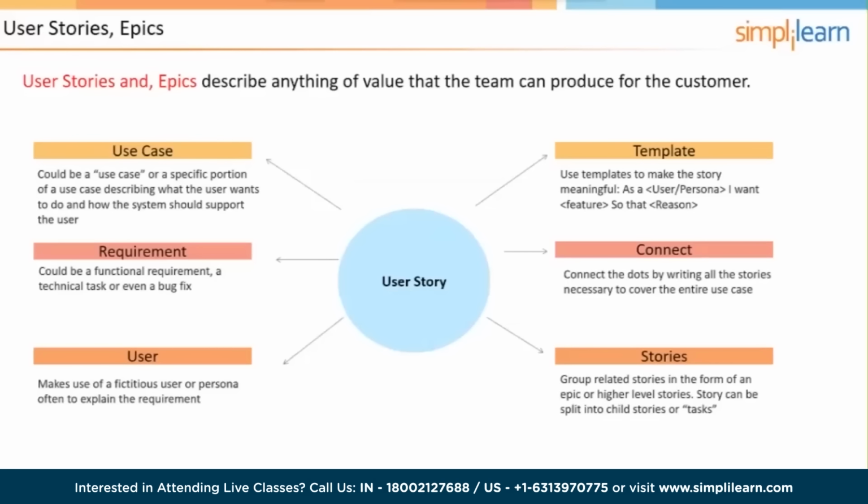So an epic is big. You would never do an epic, a theme, in a sprint. It's too big, so it's used for planning purposes. Below that, I would put epics. Epics are low priority, large user stories, meaning that an epic will eventually have to be disaggregated into multiple user stories. The reason it would be low priority is because if an epic was higher up on the product backlog, it would have to be more detailed. That's when you would break it down. So epics are usually going to live at the lower priority levels of a product backlog, and as user stories are completed and the epic rises in priority, it will eventually be broken down into more manageable user stories. So great big low priority user stories.